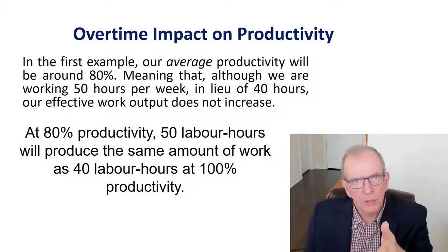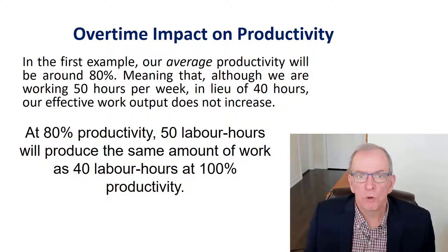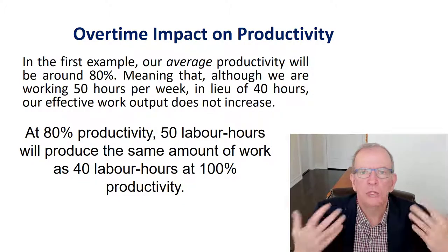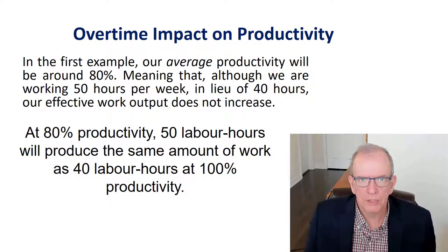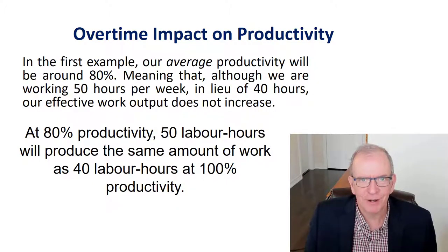And once this occurred, this is the rate we were achieving after that. Because mostly clients would like to say, well, you just estimated wrong. Your original estimate wasn't done well on this. So you want to be able to demonstrate the impacts that changes have on your projects.